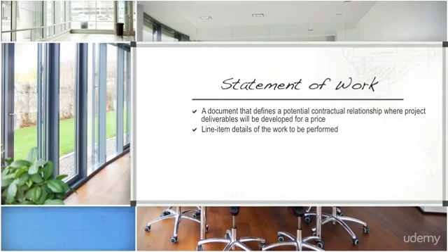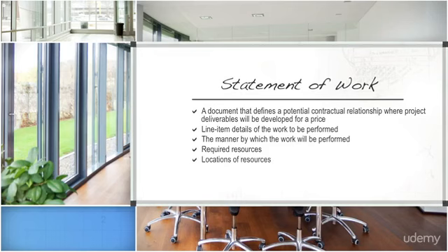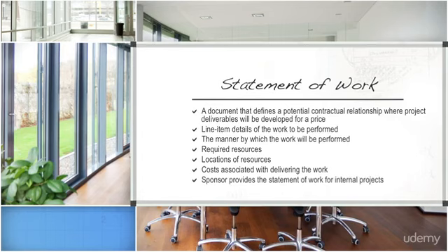The statement of work provides line item details of the work to be performed, the manner by which the work will be performed, required resources, the location of resources, and the costs associated with delivering the project work. The sponsor can provide the statement of work for internal projects. For external projects, the customer can provide the statement of work as part of a request for bid, request for information, request for proposal, or as part of a contract.